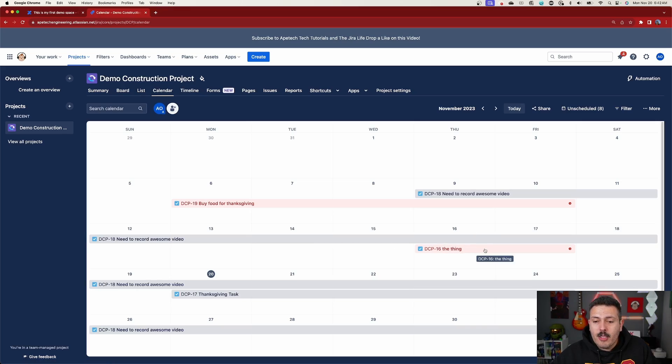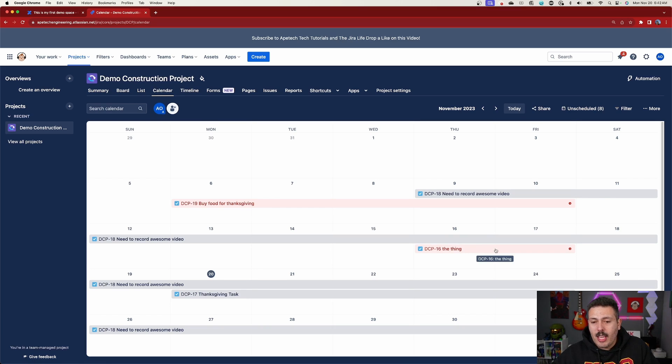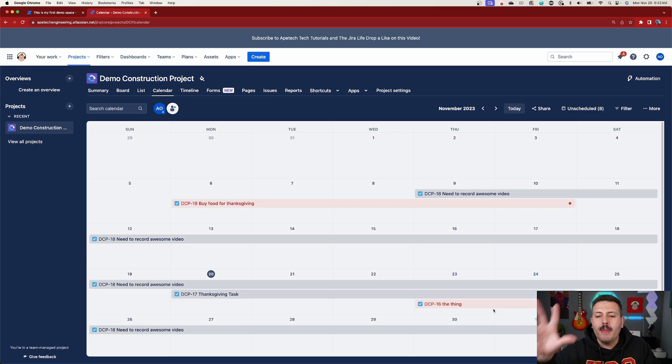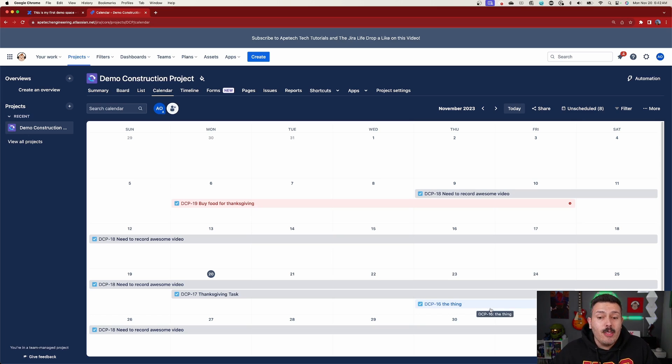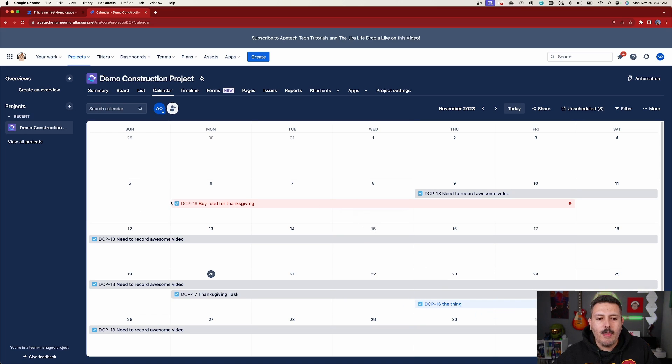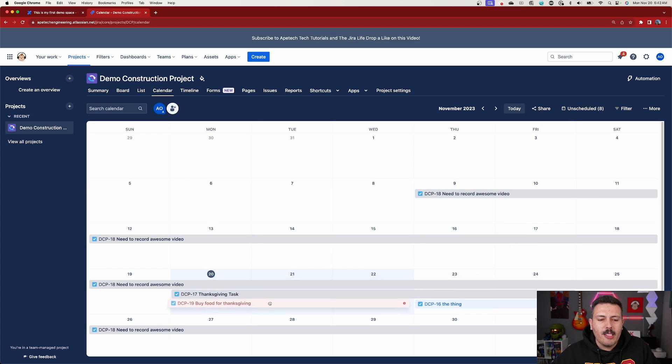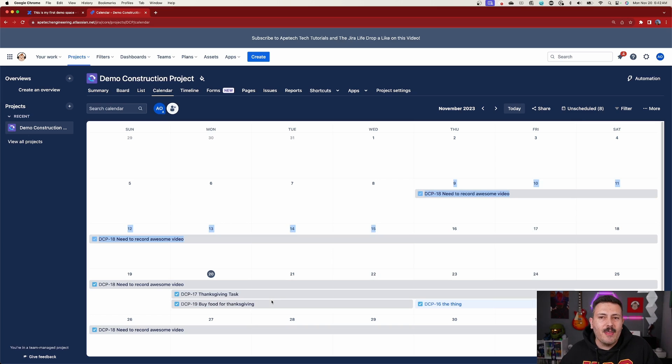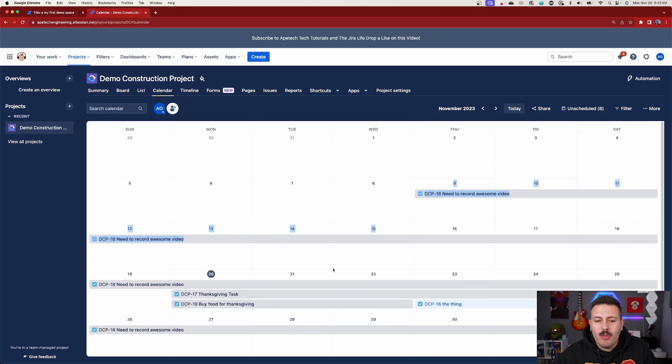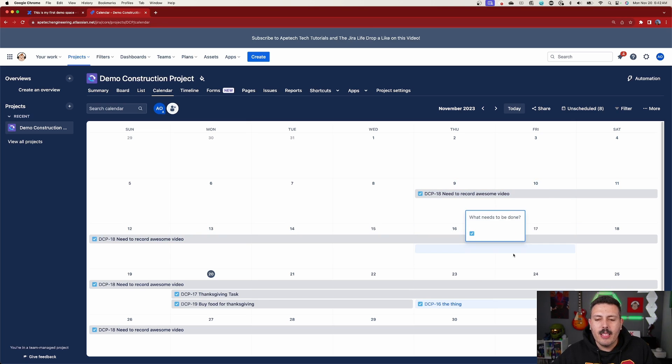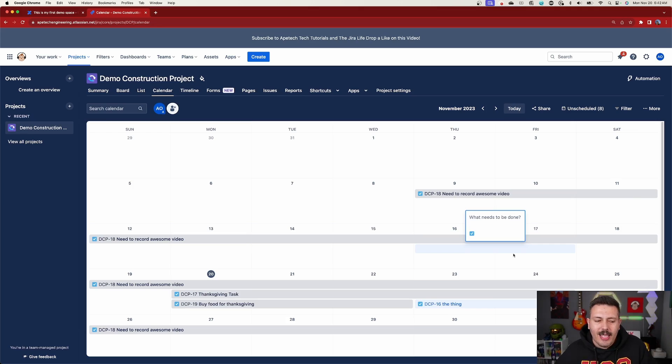Now, if you wanted to move things around, it's also super easy. All you got to do is hold to a task. Maybe the thing here, DCP 16, got delayed a week. So it's actually due next week. So we can just simply grab the whole item and move it down. And now it's not late. Now it's okay. And the same thing over here. Maybe this task, it needs to be a couple of days long so you can shrink it and we can move it out over here. And let's just say we're not the biggest preppers and we're actually going to buy our Thanksgiving food this week. So as you can see, we can just simply move things around. If you want to just do a one day thing, you can just again, click into that one cell, click a couple of cells to make a two day thing. And it's really, really easy to interact with the system here.